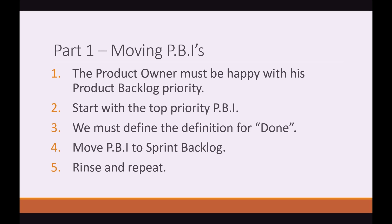In Part 1 — Moving PBIs — the Product Owner must be happy with his Product Backlog priority. That means all the PBIs in the current backlog need to be in an order that suits the Product Owner and the business. Usually, this is already done and refined in a Product Backlog Refinement Meeting. The Product Owner identifies the top priority item, then the Dev Team and the Product Owner need to understand the definition of done for that PBI. Once that's defined, we can move the Product Backlog Item to the Sprint Backlog. We rinse and repeat this process until we have filled our capacity for the Sprint.